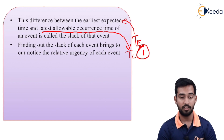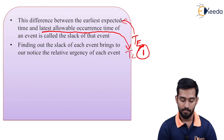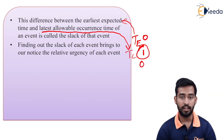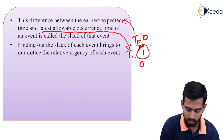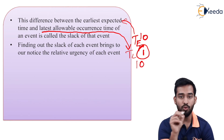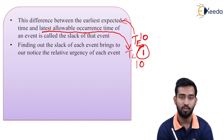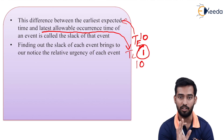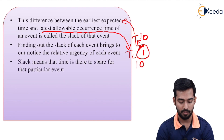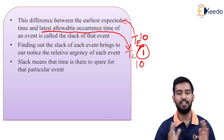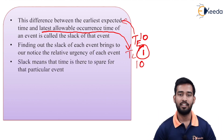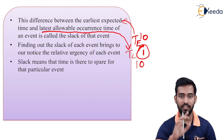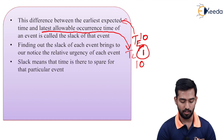Finding out the slack of each event helps you notice the relative urgency of that event. If the difference is zero — for example, Te is 10 and TL is also 10 — it means there is zero slack present. We have to start that particular event at the given time only; there is no slack available and we can't delay that particular activity. Slack means there is time to spare for that particular event. A positive slack means we have time, so we can delay that activity and relax the resources there. But if slack is zero, we can't delay that particular activity.